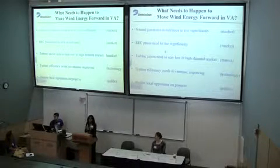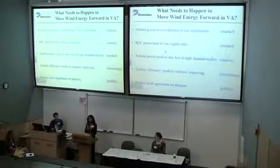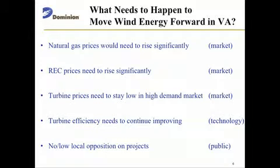That's a significant element of what's causing the market to be against wind. REC prices need to rise significantly, as Katie mentioned. The PTCs and REC prices come into play in the pro formas of your financial analysis, and they lower the cost of the project, so they help make it more economical. They will need to come up in order for wind projects to be more economical. The price of turbines right now is fairly low, but as gas prices go up, there's going to be more demand for turbines and for wind projects. Just simple economics 101, supply and demand: if you have more demand, your costs go up. So we would have to have turbine prices stay low even in a high demand market.